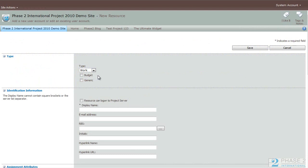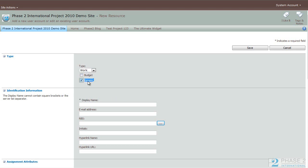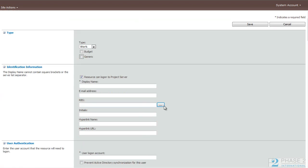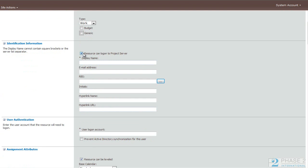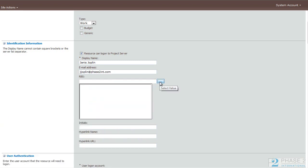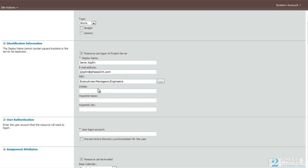So for this example, we are going to create a work resource. Depending on the type of resource that you choose, the various options that you have will change. If it's a budgeted resource, you can check this box. You check the generic box if this user is generic, and you plan on replacing it with a real user later on in the process. Here, you can choose whether the user logs into Project Server. If you check this box, you will notice that a user account box will pop up as well. We'll give this user a name, email address.